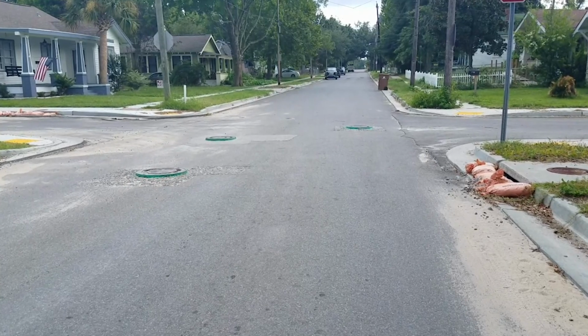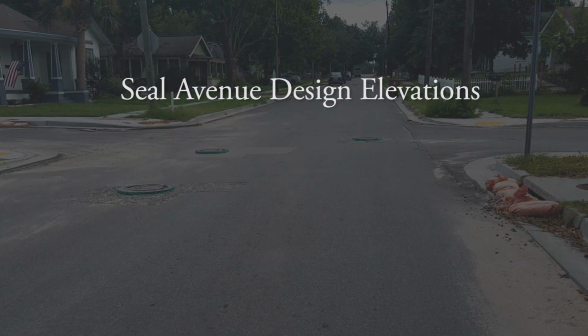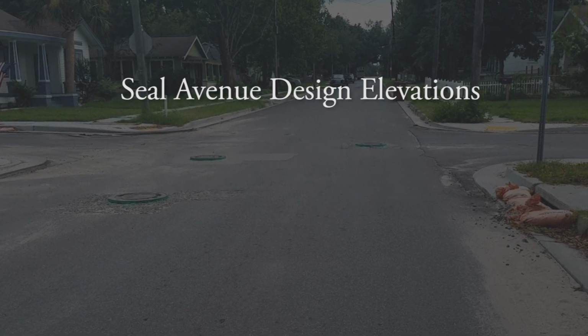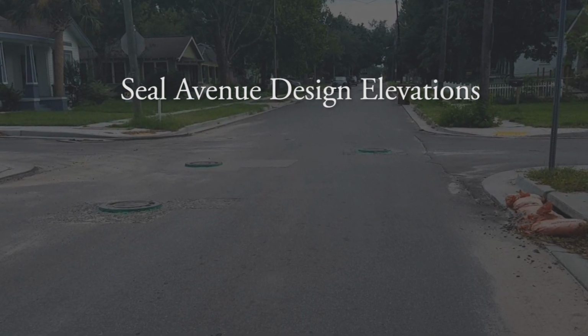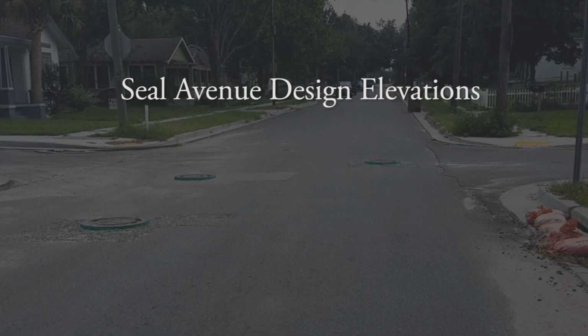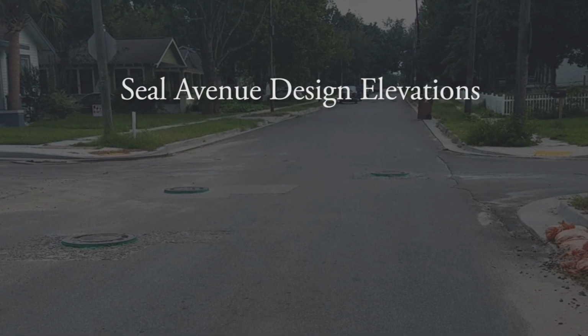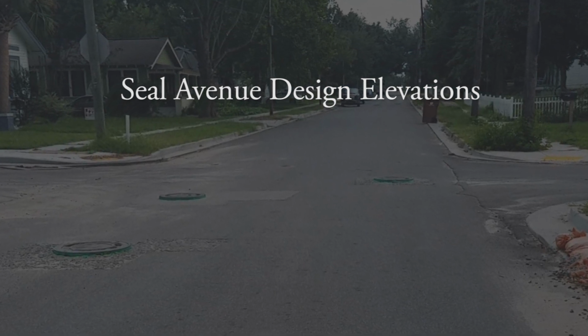Another delay that we are waiting on is the design elevation on Seal Avenue was to lower the street a few inches. We decided as a group that it would be better to keep the road at the same elevation as it originally was, so we are waiting on the design engineer to give us elevations for that street so we can continue with road restoration.